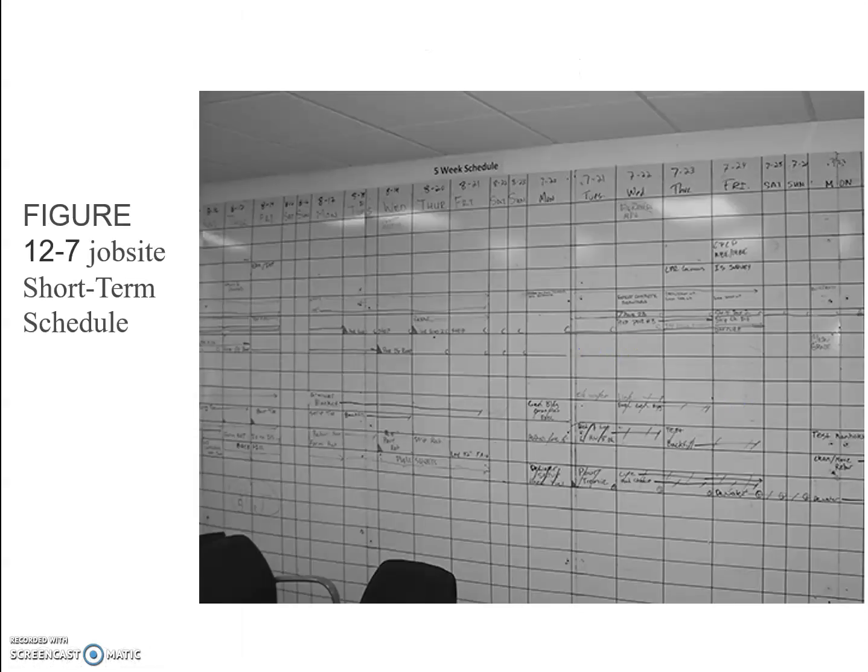There are some charts which are called short-term duration charts, which are used on the construction project. These charts basically provide some detailed clarification of the larger items in the construction schedule. They may be the schedule for power shutdown or other utility interruptions, such as shown over here. They may also be used for move-in activities for the owner. They may be scheduled for remediation work behind the schedule, and so on.